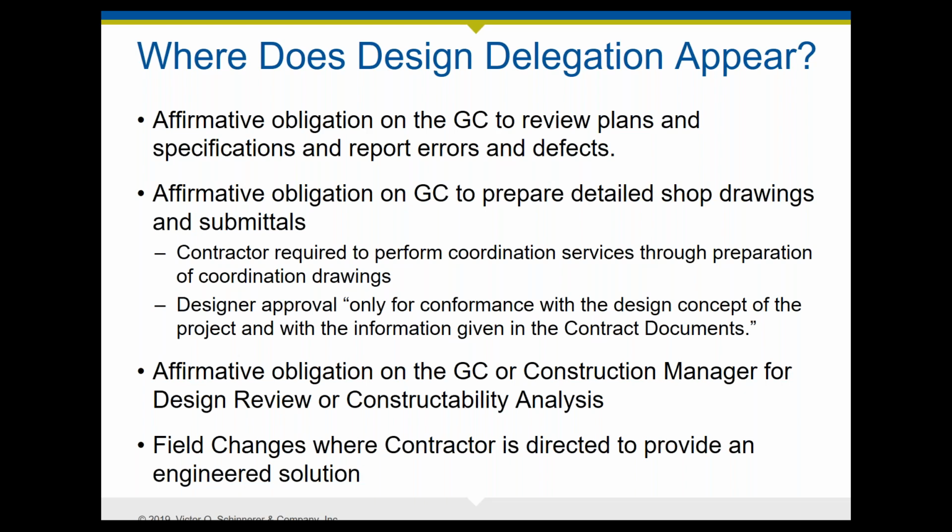The shop drawing idea does not change the contract in any way. Contractors and the flow down to specialty subcontractors always have to meet the requirements of the contract document. There are other obligations on the GC or construction manager at risk, and often that's design review or constructability analysis, and that again depends on the contract. And there are situations where there are changes in the field, and the contractor is really directed to provide an engineered solution to whatever the problem is.